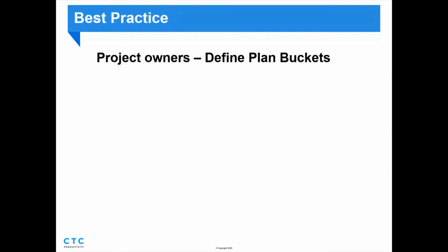There's some best practices when it comes to defining the plan buckets. I really recommend that whoever owns the project, that is one of the things that's on their list as the project owner, is to define those plan buckets, and to create the buckets before even inviting members to the plan if you can. Because that way they're already defined, and you're not going to have people just creating buckets because they're like, oh, I think one of our buckets should be this, or one of our categories should be this. So taking that on as a role as the project manager or the project owner, I just feel that that's a best practice.